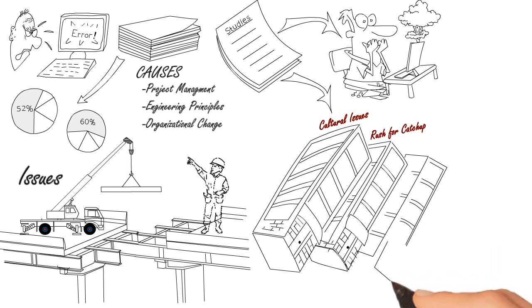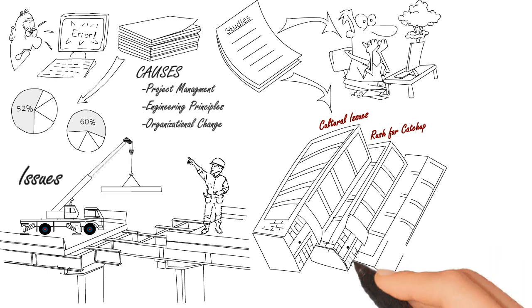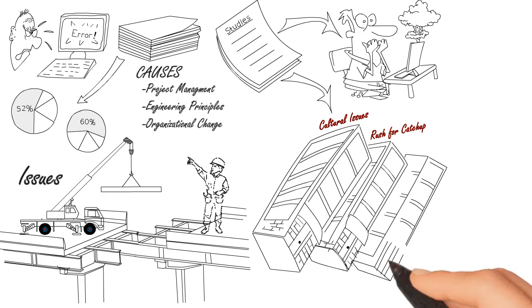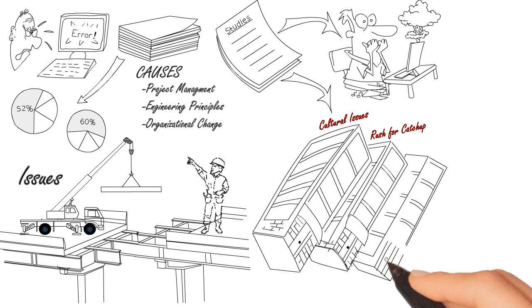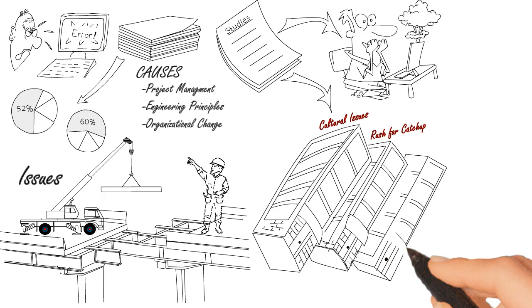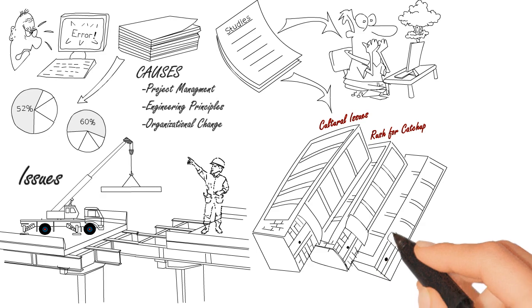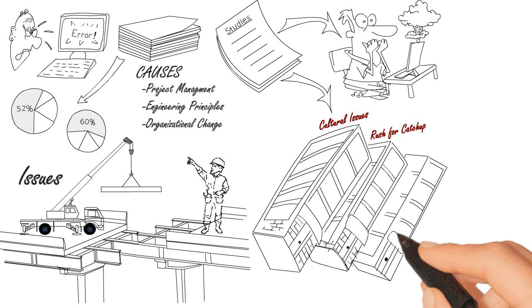The top-down approach that many donor-funded projects take is contrary to a model that advocates user involvement. These projects are often managed by outsiders with cultural constraints to involve the local community in the implementation process and facilitate the handoff for success.